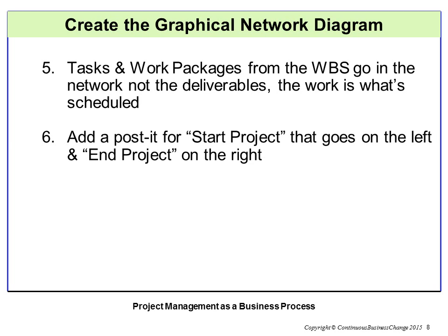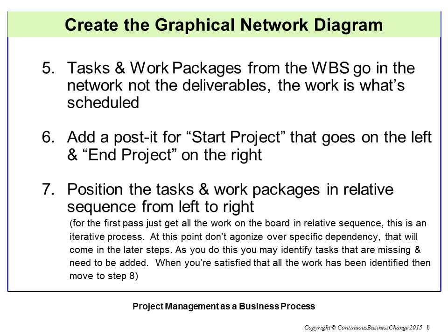Add a Post-it note for Start Project that goes on the left and End Project on the right. Position the tasks and work packages in relative sequence from left to right. For the first pass, just get all the work on the board in relative sequence. This is an iterative process.